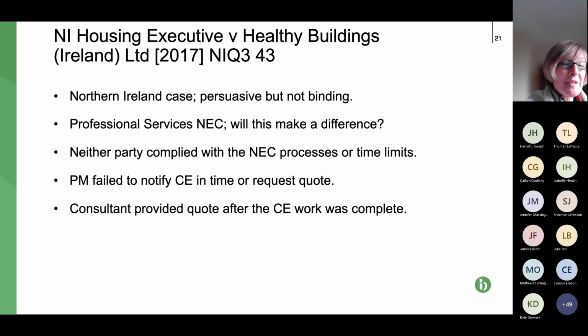So effectively, it was complying with the NEC form of contract, because, of course, we know from what we've seen about the switch date, you calculate your actual cost up to the point when the PM instructs the additional work, and you do your forecast cost from then onwards. And the guidance notes are clear that doesn't change if the circumstances change. So under the contract, technically that was correct. But of course, it's a slightly false way of doing things when the work's being completed. So bear all those points in mind.